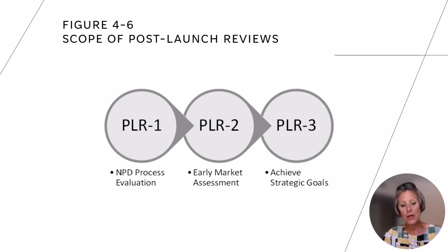Planning and estimating staged and gated projects are further benefits gained by effective post-launch reviews. While such data may vary widely for radical innovation, routine next-generation products and incremental innovations tend to follow similar development patterns. Data from the PLR1 describing the number of staff, length of project stages, and cost of each stage is collected by the process owner.